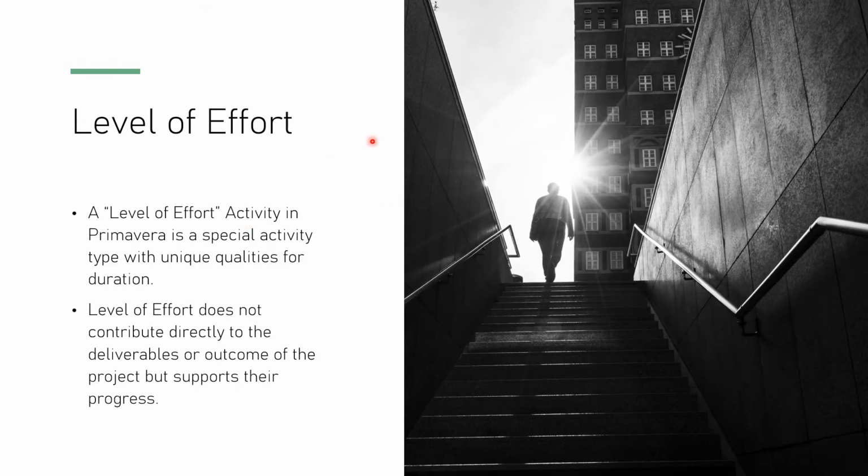What is level of effort? A level of effort activity in Primavera is a special activity type with unique qualities for duration. Level of effort does not contribute directly to the deliverables or outcome of the project, but supports their progress.